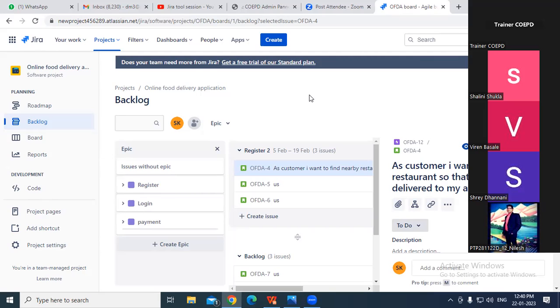What I am saying is that we have to make the changes in the product backlog, because we already created the backlog, right? Yes, of course. All the changes should be put into the product backlog only. You don't put them directly into sprints.